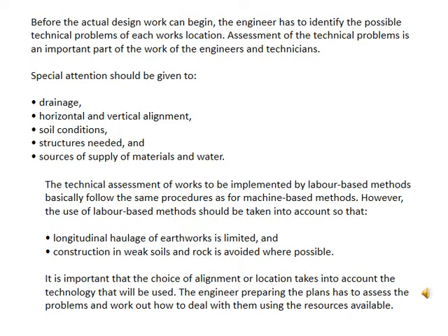The technical assessment of works to be implemented by labor-based methods basically follows the same procedures as for machine-based methods. However, the use of labor-based methods should be taken into account so that longitudinal haulage of the soil is limited and construction in weak soil and rock is avoided where possible. So this is an important aspect of technical assessment for labor-based work.